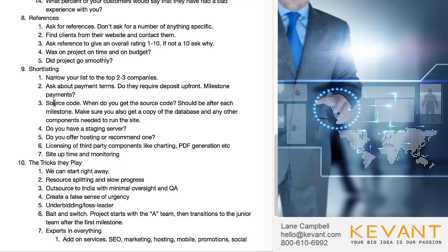The next thing that is extremely important, and this is an issue that happens all the time, is where a company will hold the source code hostage on a company that's using their services. One of the ways that you want to prevent that is to ask, when do we get the source code? And the answer to that should be that you get it after each milestone. Let's say that you've got a project that's split up into 4 milestones. After you pay for the first milestone, you should get the source code and a copy of the database at that point, because you've paid for the code and the development up to that point.